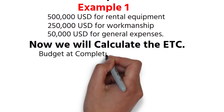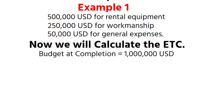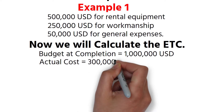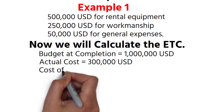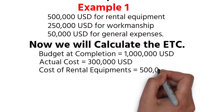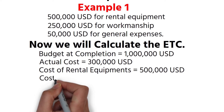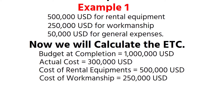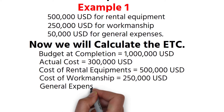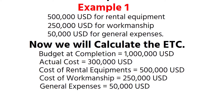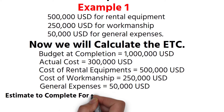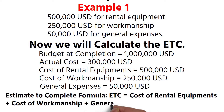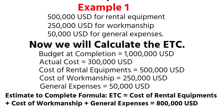Now we will calculate the ETC. Budget at completion equals 1 million US dollars. Actual cost equals 300,000 US dollars. Cost of rental equipment equals 500,000 US dollars. Cost of workmanship equals 250,000 US dollars. General expenses equals 50,000 US dollars. Estimate to complete equals cost of rental equipment plus cost of workmanship plus general expenses, which equals 800,000 US dollars.